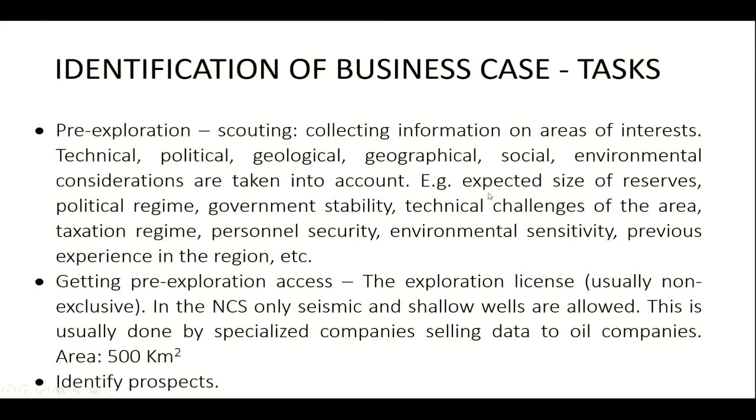Yes, so also expected size of reserves, political regime, if we are not talking now about Norway only, but some other parts in the world, government stability, technical challenges of the area, if it's the Arctic area, if it's very deep in the Gulf of Mexico, the taxation regime, security of personnel, if I will be able to travel to and from the field, if the field doesn't have risks to be attacked in the region, or an armed offensive. Then environmental sensitivity.